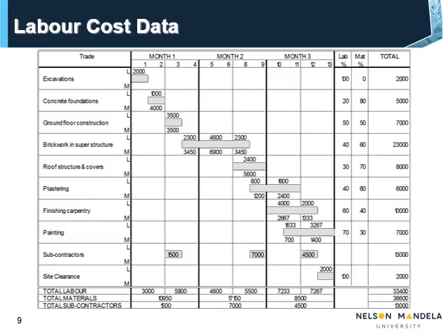The first thing to do is to consider those costs that will be paid every 2 weeks. In this case it would only be for labor. So, start with the column representing the first 2 weeks of month 1 on the bar chart. You will find that the labor cost for each activity is indicated at the top of each activity bar. Now, add up all the labor costs for each activity.